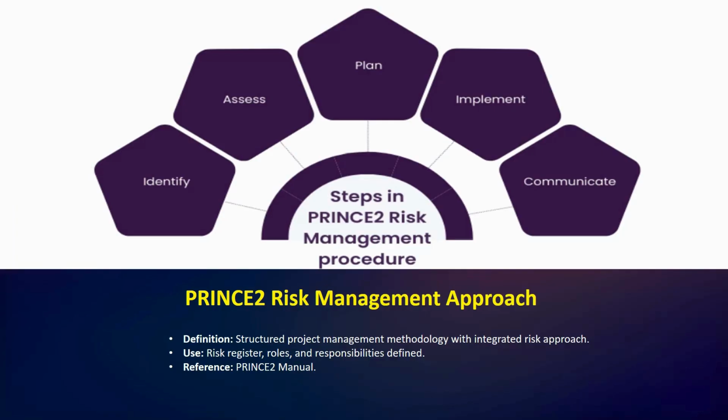So next we have the PRINCE2 risk management approach. The PRINCE2 methodology also has a strong focus on risk. It requires the creation of a risk register where all identified risks are recorded and tracked. It also defines specific roles and responsibilities for risk management.